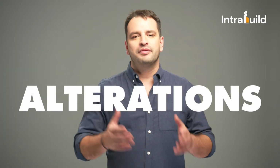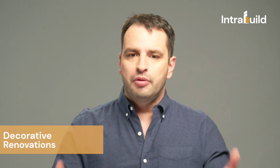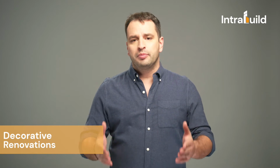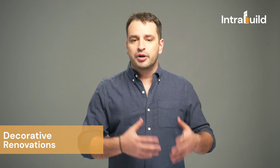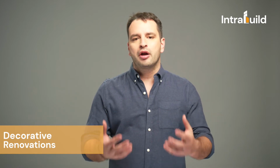There are two different types of renovations, decorative and alterations. Decorative means when you want to refinish your floor, skim coat and paint your walls, replace your doors, your trims, or your kitchen cabinets. In this case, you may still need to pull some permits from the Department of Buildings, but your licensed electrician and your licensed plumber can pull those permits online without you having to hire an architect and file with the Department of Buildings.